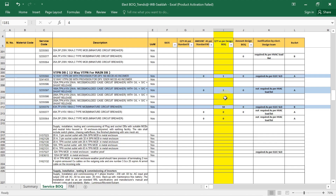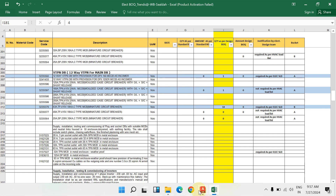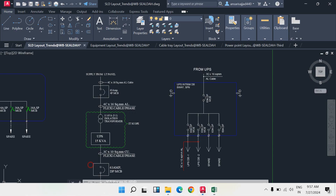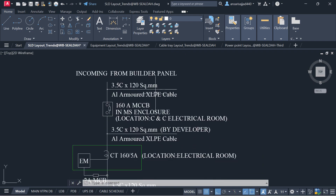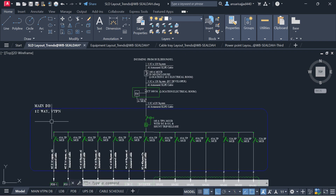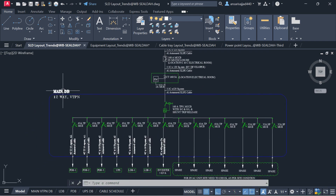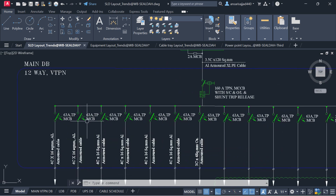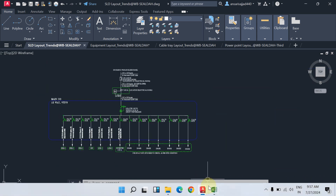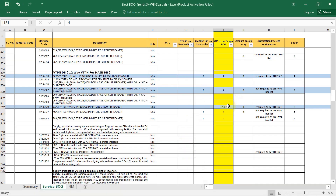We are also using a VTP and DB — the main DB. In the SLD you will find a 12-way VTPN DB which is our main DB. You need to find out the 163-amp triple pole MCB quantity and write that down here.